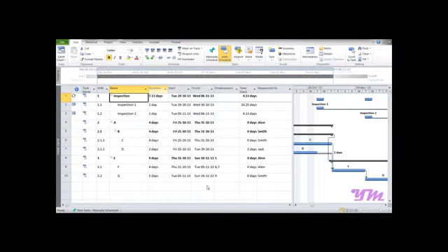Module 8, Group by and Filter function. Now we'll first look at the group by function. Group by is basically used when we want to group the items in the view based on some specified criteria. Say we want to see all the activities together which have the same responsibility, or all the activities grouped together in which the critical slack, or what we can say the total slack, is critical, that is it is 0.